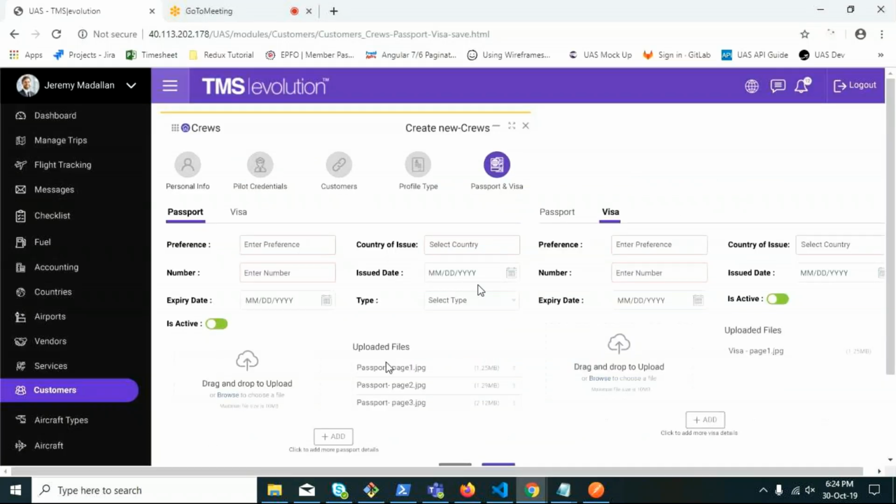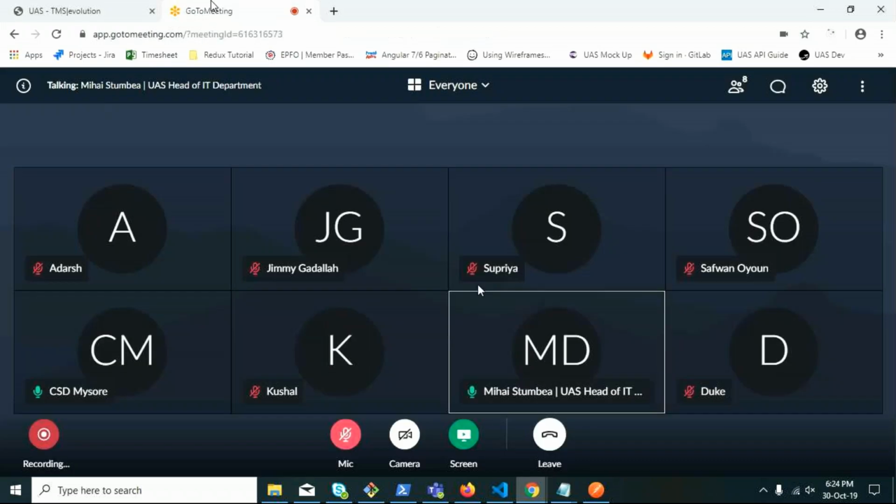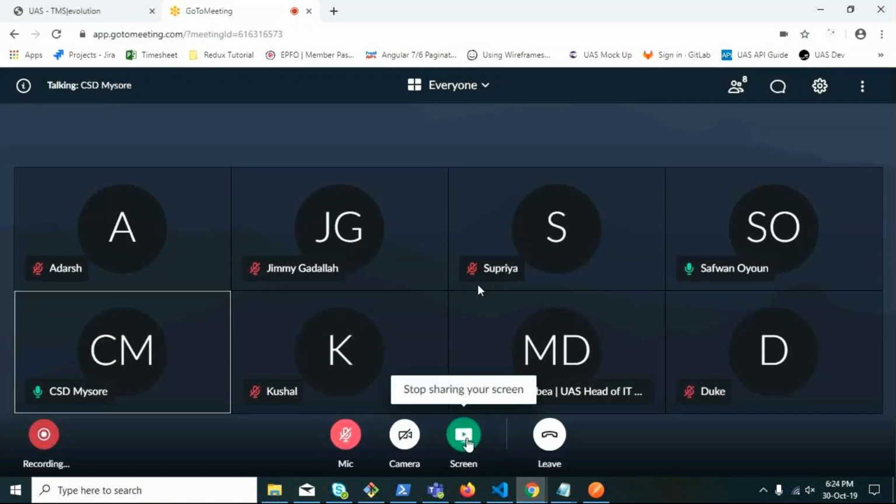Yeah, so I have made a note of all your feedback, and as Safwan told, from the last sprint onwards, I will document it in Jira as a task, or if it is a really long feedback which will take more effort, I will make it a user story. Or if a defect already exists for some of your feedback, I will mention the defect. While sending the MOM, I will update that and share it across to the stakeholders.